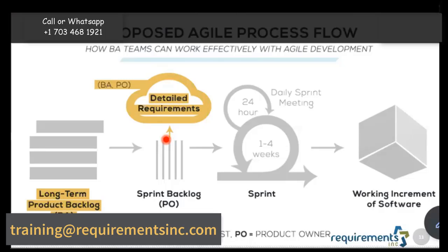So in companies, what they do is they would take, okay, you have an 8-hour workday, a couple of hours are gone in meetings and whatnot, right? So 6 hours is approximately 1 day's worth of work you're able to deliver. And a company might say, okay, one story point equals 1 day. And then 2 story points is 2 days.